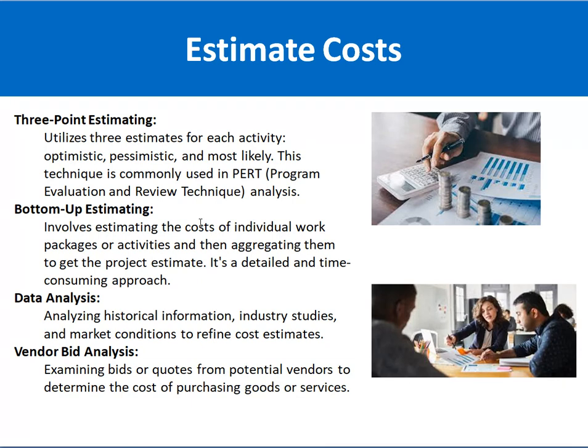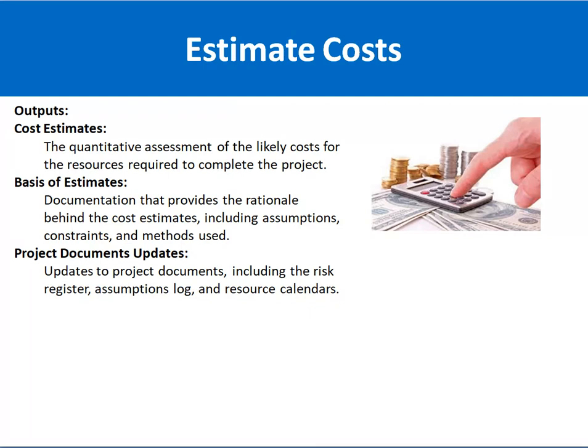Then next is the data analysis, analyzing historical information, industry studies, and market conditions to refine the cost estimates. So this is also another approach to estimate cost. Then vendor bid analysis. Vendor bid analysis means that you request different vendors to bid for the requirement, and you examine bids or quotes from potential vendors to determine the cost of purchasing goods or services.